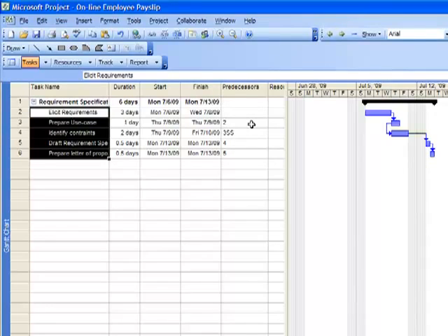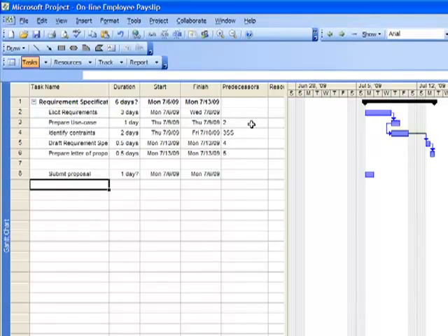We identify milestones to target important dates in certain stages of the project. In this case, we want to know which date we submit our proposal. We enter 0 day on duration to indicate that this is a milestone. Notice the diamond symbol for the milestone. Because this is dependent on the completion of the letter proposal, we put 6 under the predecessor column.